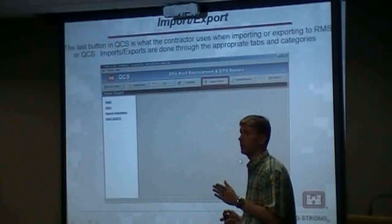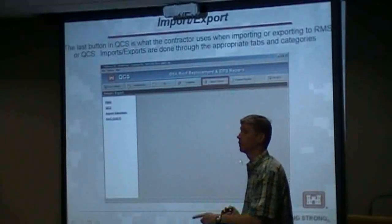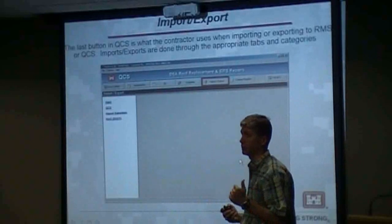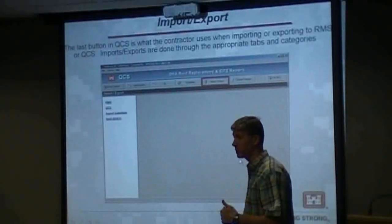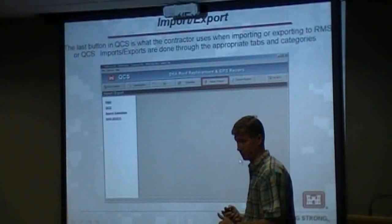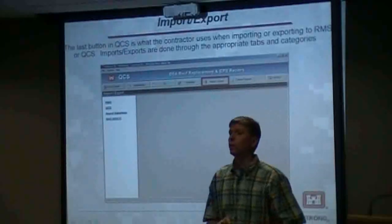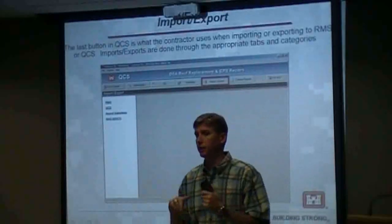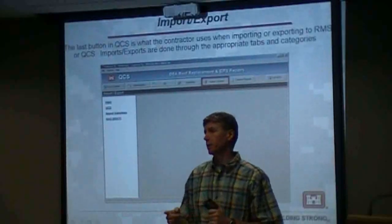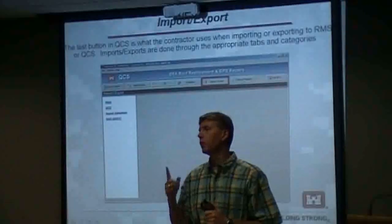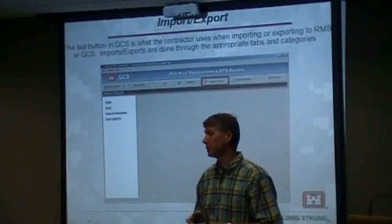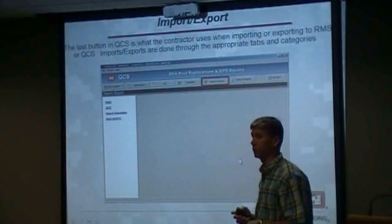If that's the case, the master site needs to be the field office, not the home office. Otherwise, the home office is going to be very busy doing import-exports with us. If you want to have good data exchange and keep data up to date, you need to import-export at minimum once a day.